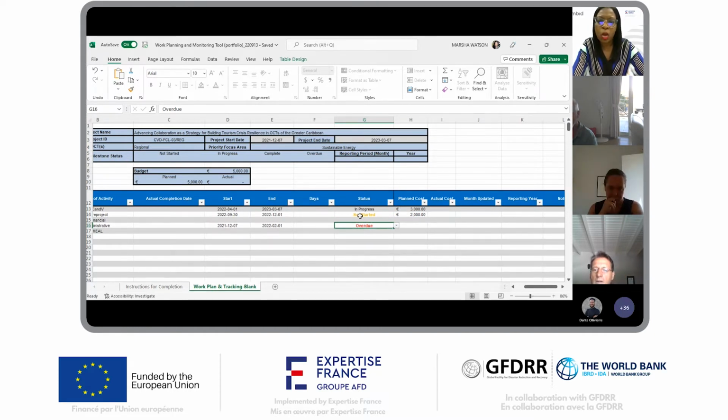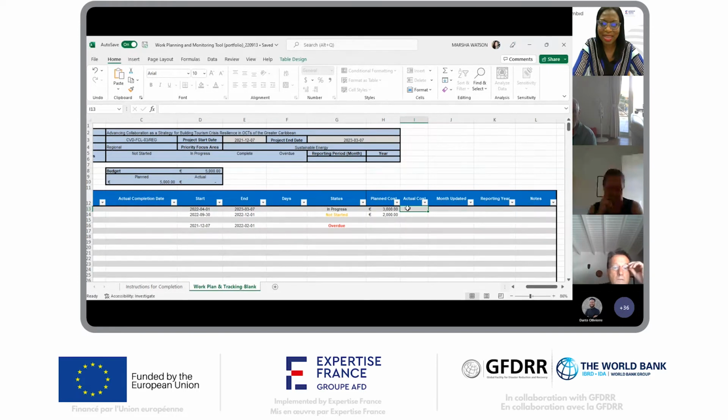All right, so once an activity is in progress, then once you report on a monthly basis, you are required to indicate what the actual cost is. So for this activity, the social media promotion that is in progress, you are required to enter how much has been spent to date on a monthly basis. So since the start date of 1st of April, you would be required to indicate what has been spent so far. It could be 1,000 euros. So we enter 1,000 euros and you'll notice that that is automatically updated.